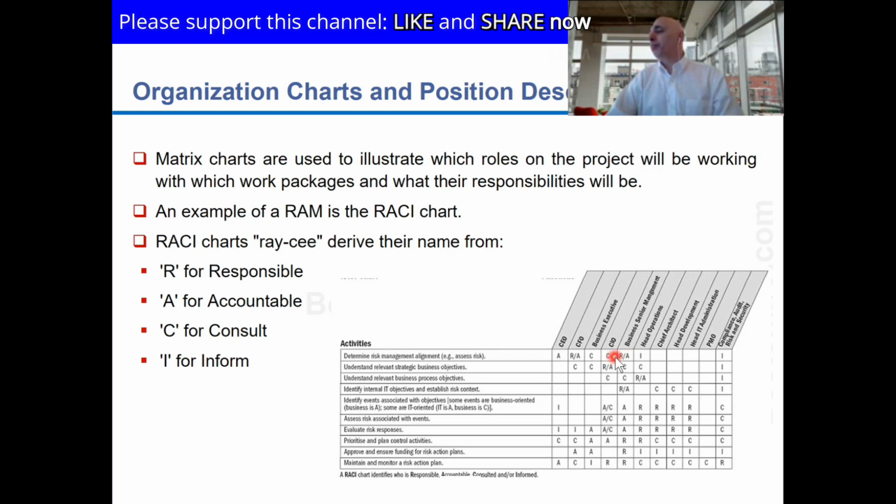And likewise, you can have somebody who's the key engineer that everybody can go to if they have technical questions. Maybe someone will be accountable for safety procedures, another one accountable for supplies, to make sure that we're not wasting them. And maybe somebody is accountable to manage the contractor to make sure that they're behaving or not doing something wrong. So you need accountable people for these things, but you also will have other people who will assist. These are responsible people.